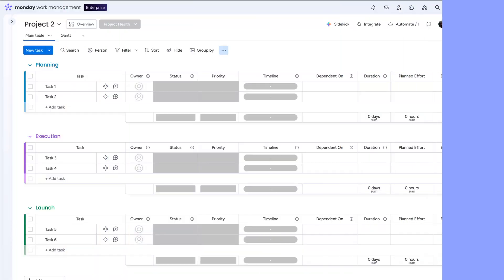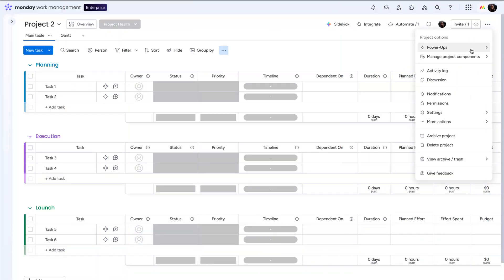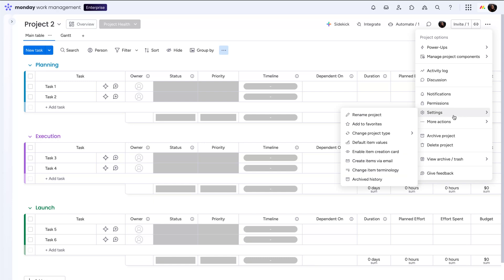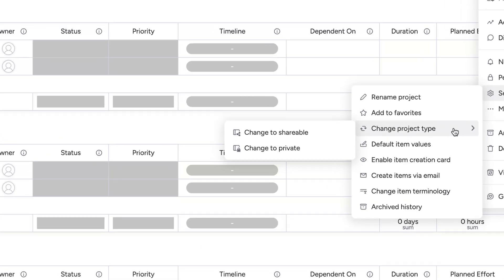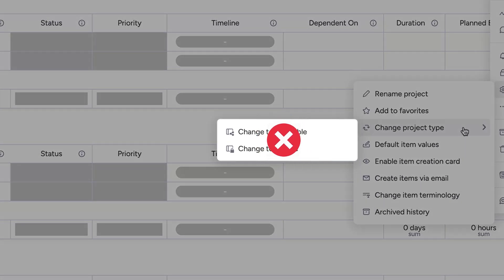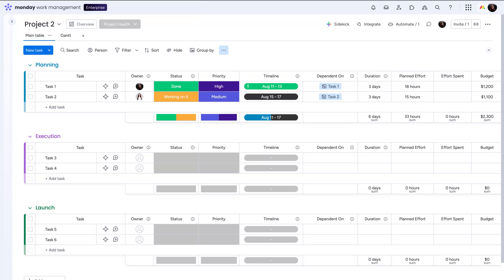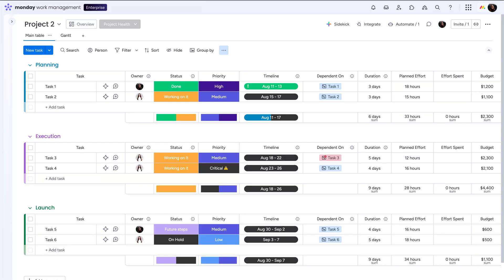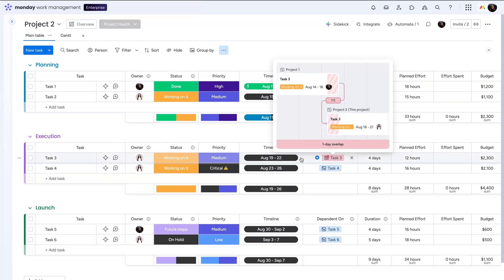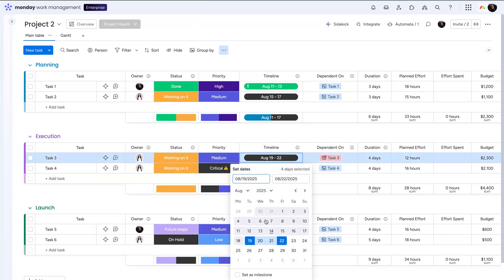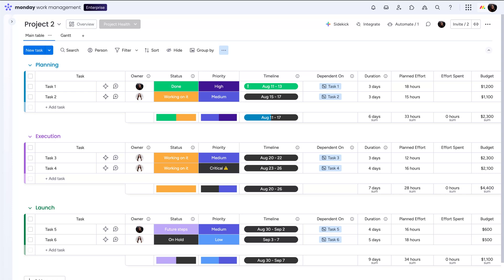A quick note, cross project dependencies only work with main boards, not private or shareable ones. And here's a Monday pro tip. Set timelines for every linked task. This will surface scheduling issues early, so instead of playing catch-up, you're staying one step ahead.